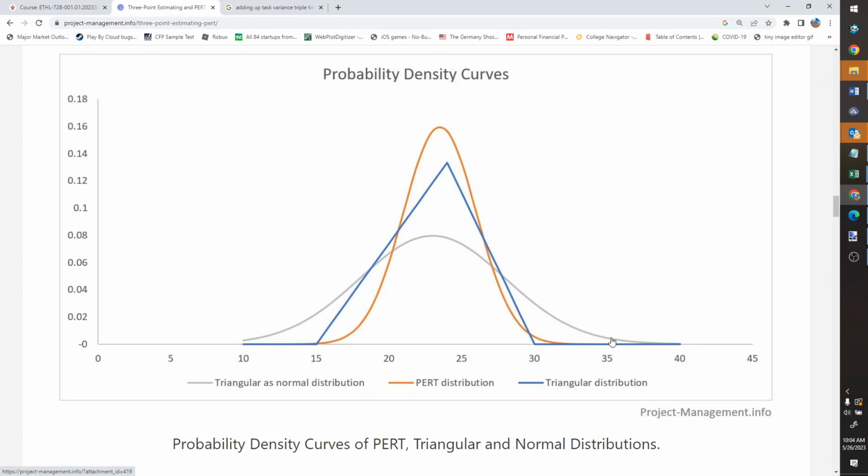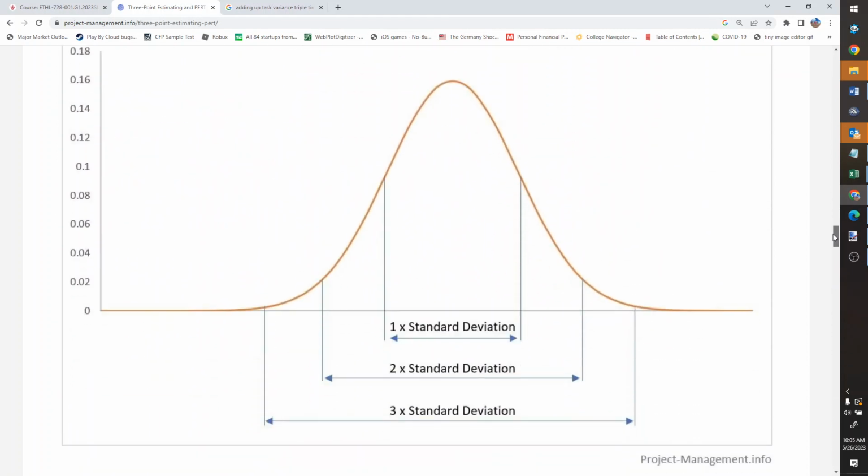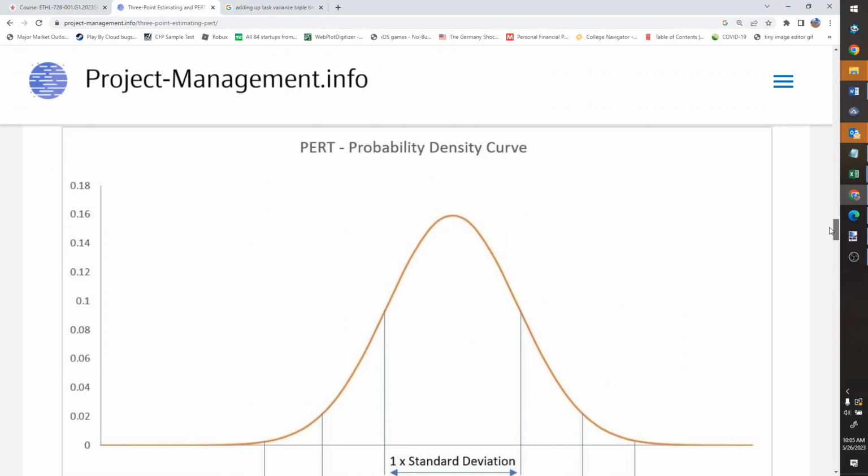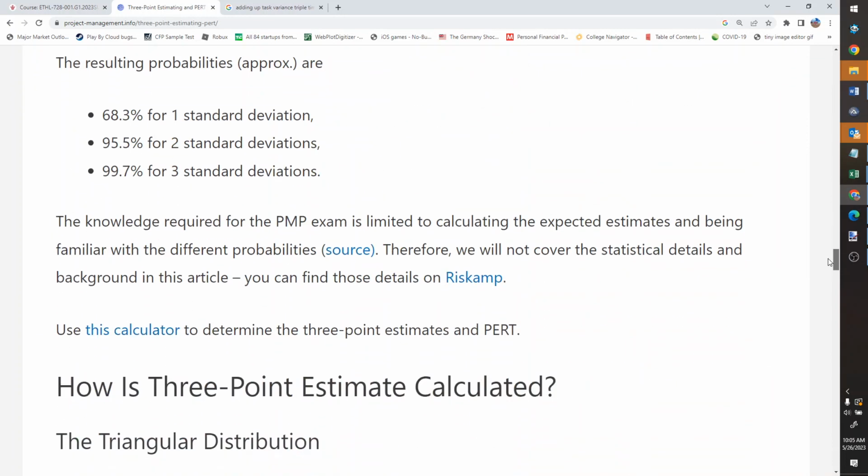So you can see in this example, the pessimistic outcome is 30 and the optimistic outcome is 15, but the most likely isn't 22.5. It seems to be something like 24. So this distribution is a little left skewed. It doesn't have to be perfectly symmetric, but we can specify it just with those simple numbers. So you get this kind of bell curve you're defining.